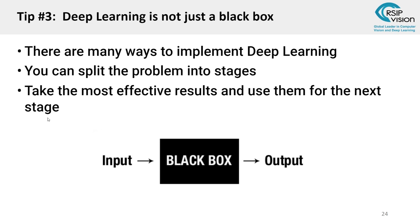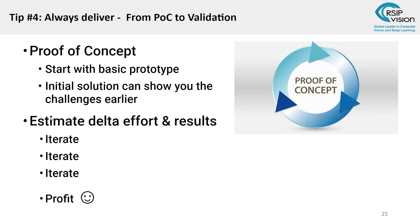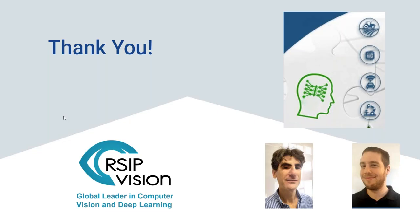General Tip 4: Work in short cycles — this is true of software development in general, but especially true of algorithmic development. In R&D there are always risks and unknowns — you don't know ahead of time the specific algorithmic or data challenges that will come up. Work with relatively small cycles and try to deliver some tangible result on a weekly basis — whether an updated software version or an explainable visual result. Short iteration cycles and constantly reassessing the problem will ultimately give you a good result.